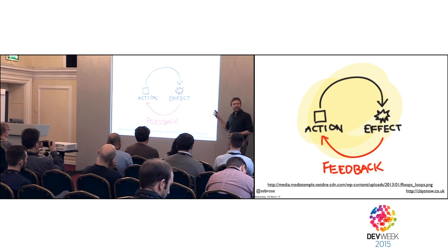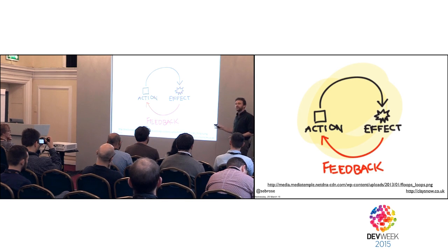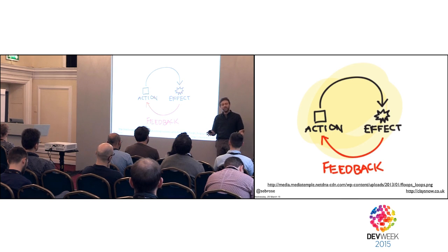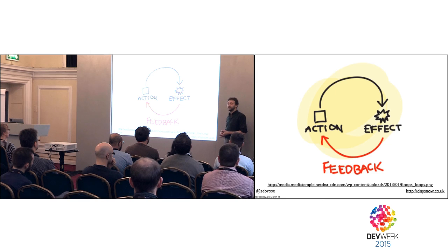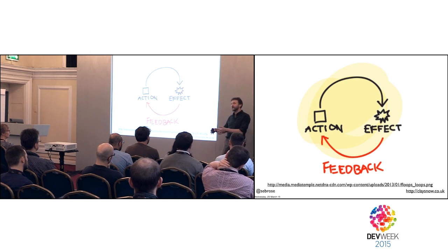The whole point of all of these methods was to try and get feedback quickly, so that if we'd made a mistake, if we'd misunderstood something, if the business had changed its needs, we could respond to that quickly. We wanted to get things in front of the customer on a regular basis. So XP, which was started in the Chrysler C3 project in the 90s, wanted to get the customer proxy to sit with the team all week and look at things as they got delivered. Scrum talks about delivering and doing a sprint demo every 2 to 4 weeks. And other methods fall somewhere in between. But when you compare it to 6 months or a year or 2 years, 2 to 4 weeks is miraculous.